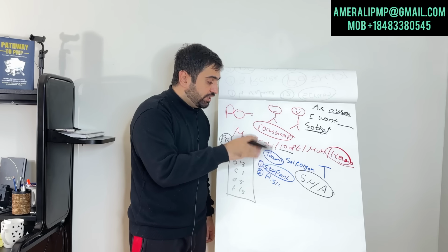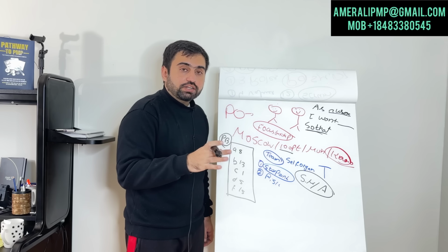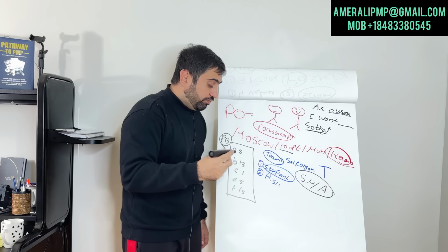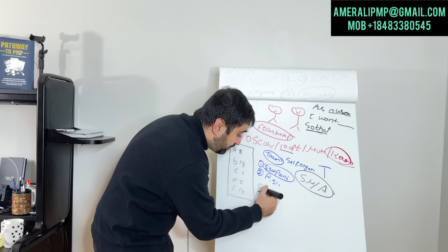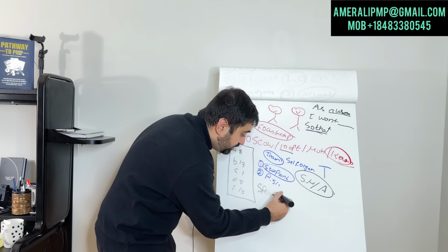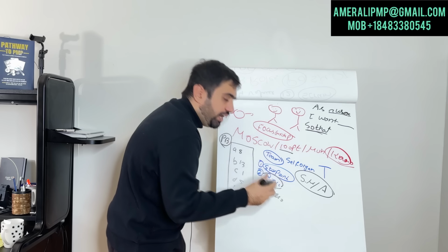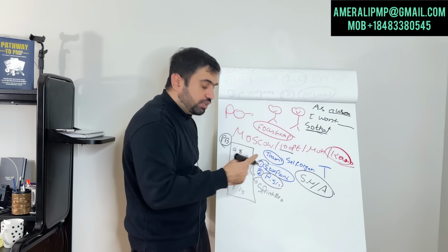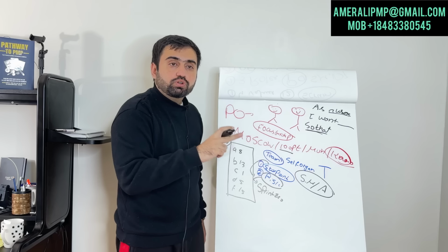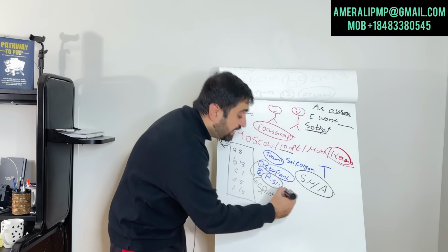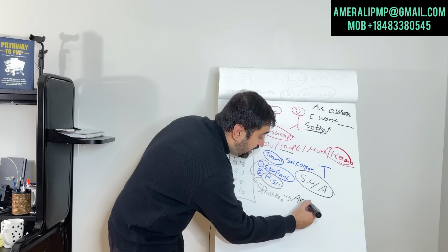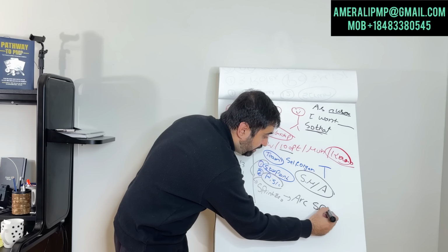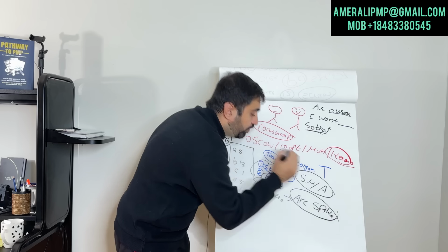So we have this thing, we have a prioritized product backlog. Now the team will start the first sprint, sprint 0. Actually these risks are also done in sprint 0. These things are also done in sprint 0. So we have already done a few things which are done in sprint 0. In addition to that, I will do an architectural spike, which is proof of concept.